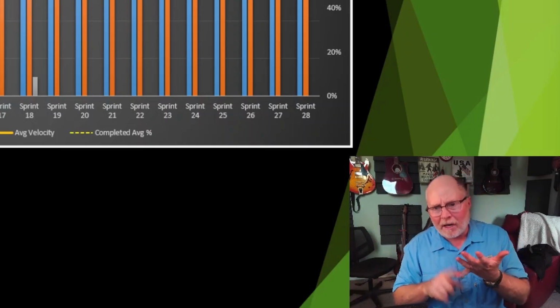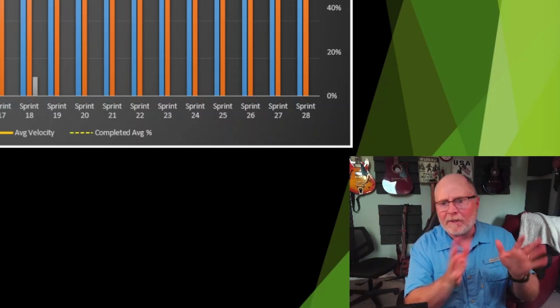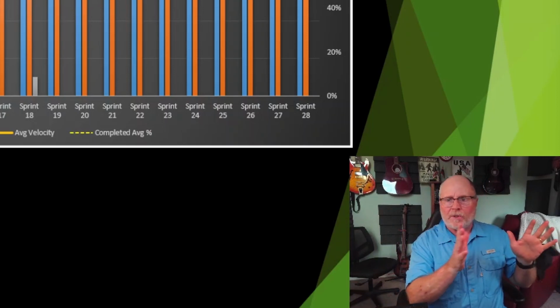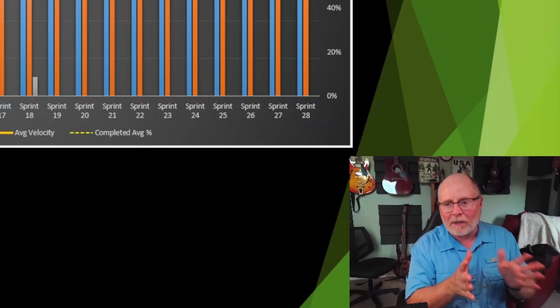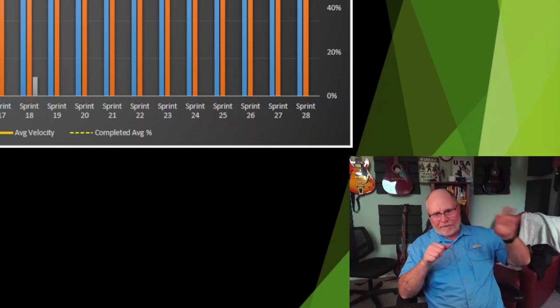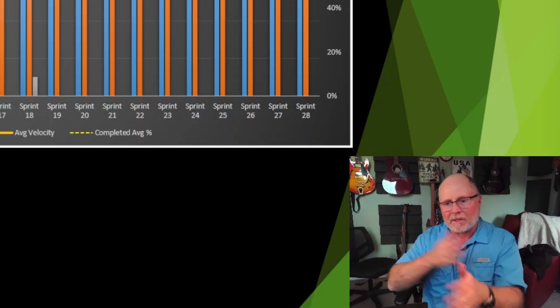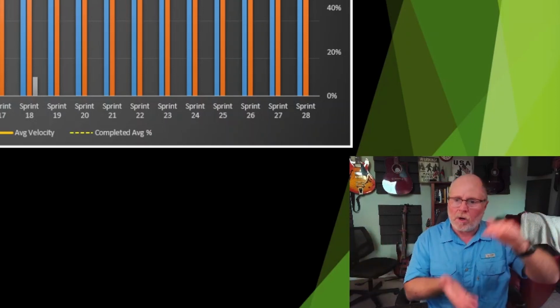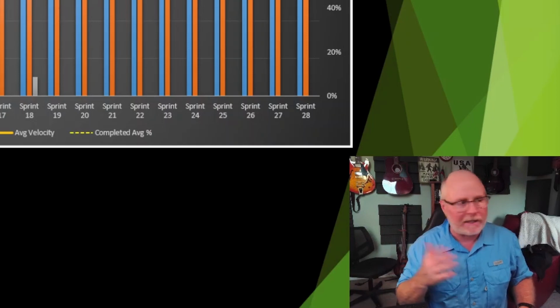So once we introduced some automation tests and some other techniques, improved the quality of the environment, the data quality, so that they were convinced that their tests were reliable, they began to speed up. We also then helped to get the developers, once we got to our WIP limit, the developers would pivot and start helping to test. And we no longer had any queues of 40 items in a waiting status.